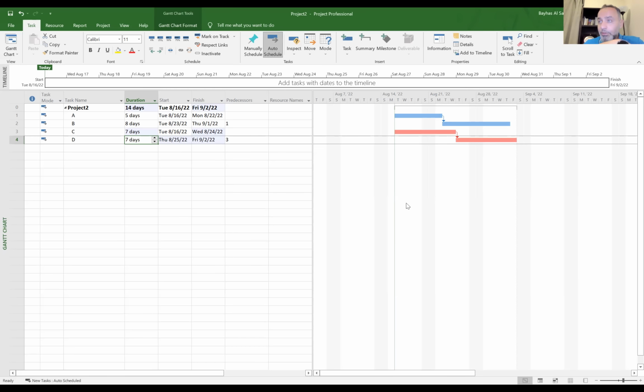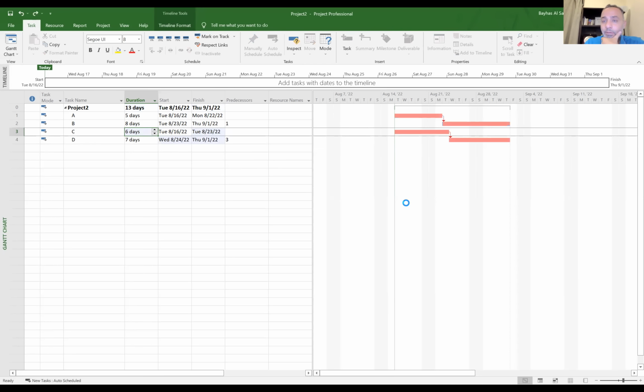And this is important because for me as a project manager, again, I need to monitor the critical path because it is always the path that determines the project finish date. Okay, so I need to know the float. We call it the float or slack of those activities, activity C and D. How do you suggest that we calculate the float of C and D?